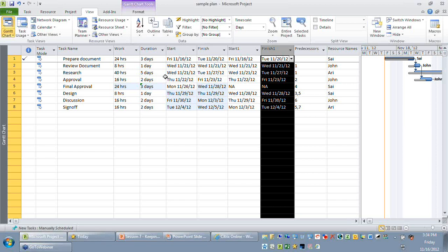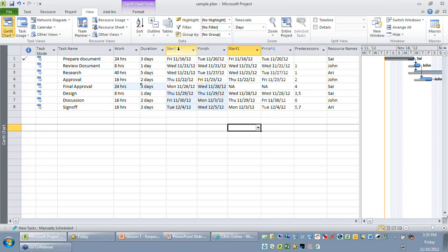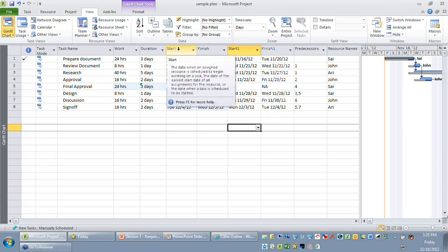You might want to add, let's say, 5 to 10 different activities across different phases of your project because of an approved change request. Naturally, your changes will be distributed, and it's quite difficult to find which activity got impacted and which did not, because you need to share only those activities that got impacted with the customer for approval and review. So now I have done it. The job we have is we need to compare start with start one, finish with finish one.